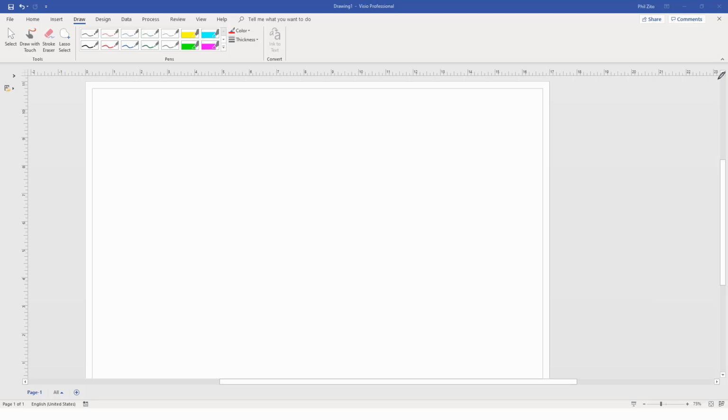Or are you talking about just overall? Because overall, the network is going to be typically configured by IT, who is then going to give you settings, and then it is your responsibility to set those settings in the actual controllers. So whoever owns those controllers is usually who has to apply those settings.